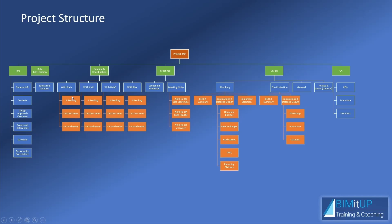You have pending items where you're waiting on information from another party; once received, it becomes an action item for yourself or your team; and once acted on, it becomes a coordinated item. Similar workflow for civil, HVAC, electrical, and other trades. For meetings, you record your meeting schedule — for example, every Tuesday at 3 PM — and keep meeting notes grouped by date and description, such as February 2nd design development page flip.